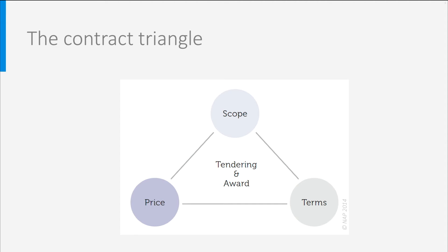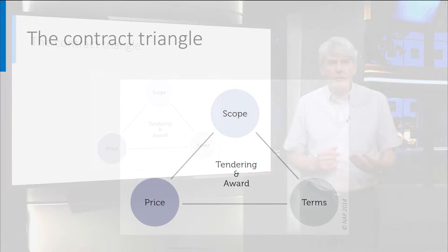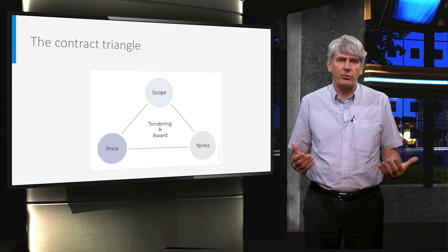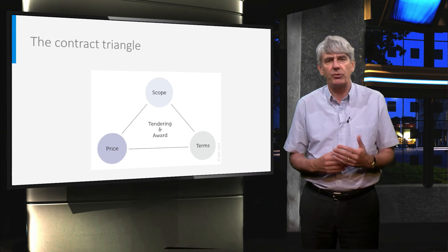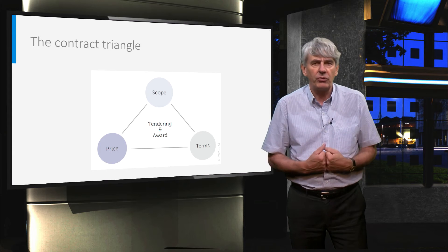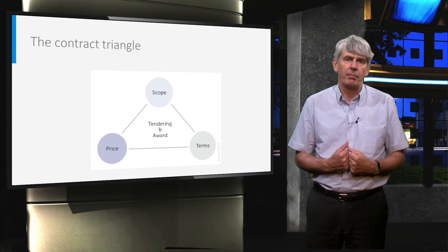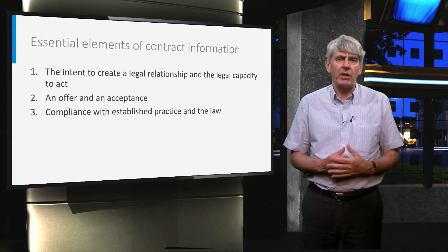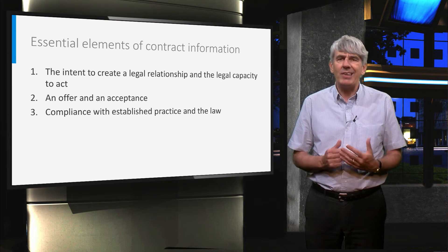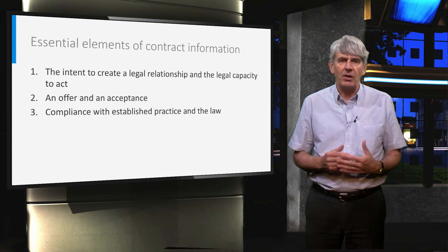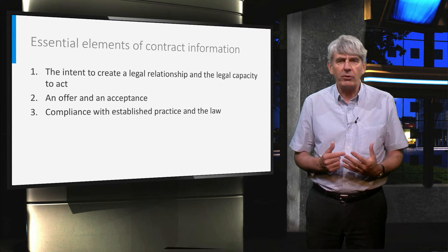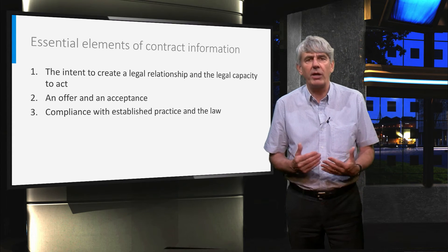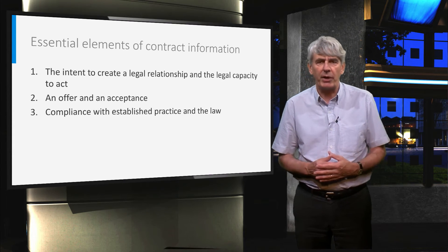As illustrated in the figure, these elements are interrelated. In the contract, a fit-for-purpose balance is established through an iterative process of qualifications and negotiation during the tendering and award process. The main and essential elements of a contract are the intent to create a legal relationship and the legal capacity to act, an offer and an acceptance, and compliance with established practice and the law.